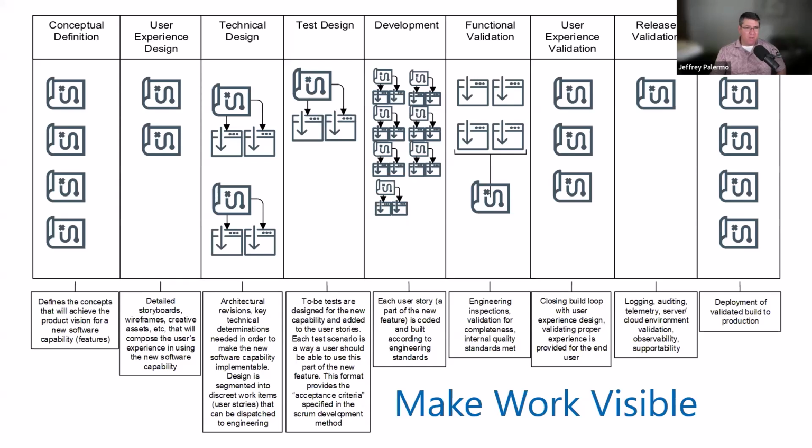If you don't have a visualization, a tool that allows you to quickly see that we have a backlog or a bottleneck in user experience design, then you may be asking the people writing the code, why isn't this flowing? And the answer is, we can't write any code for it yet because we're still haggling on how it should look, what fields are important, and what data fields are coming from outside systems.